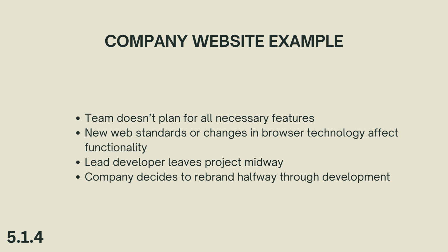Second, we have the risk of changes in technology. New web standards or browser updates could affect the site's functionality mid-development. To mitigate this, the team should stay updated on upcoming changes in web technologies and build flexibility into the design to accommodate future updates.